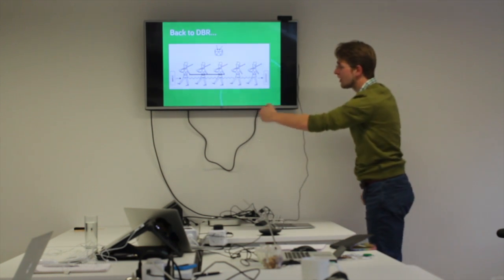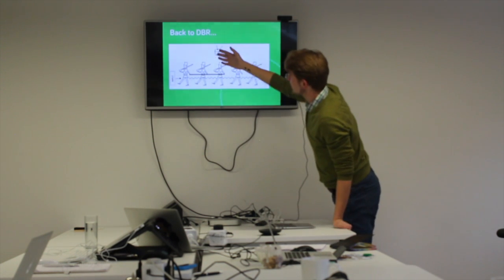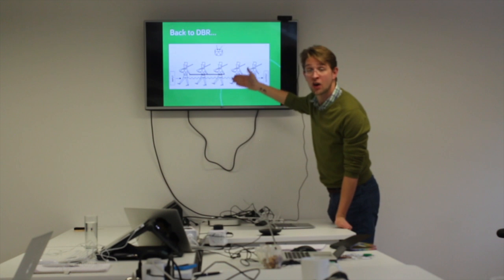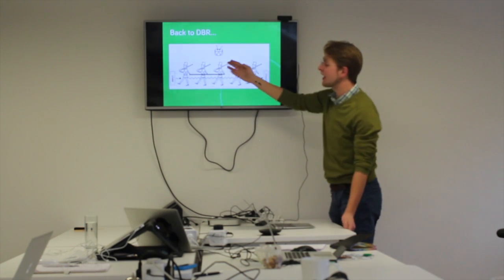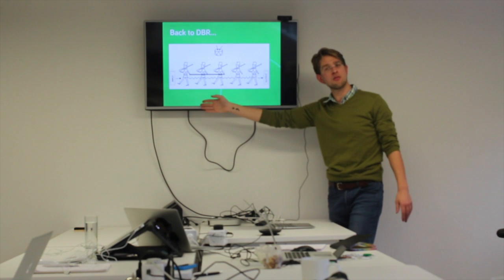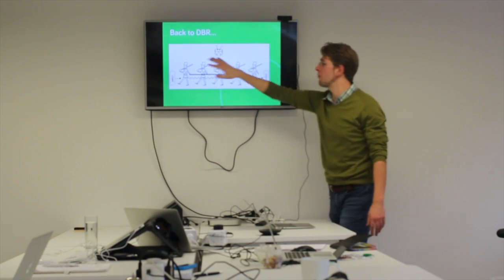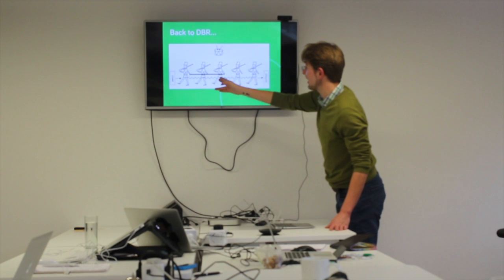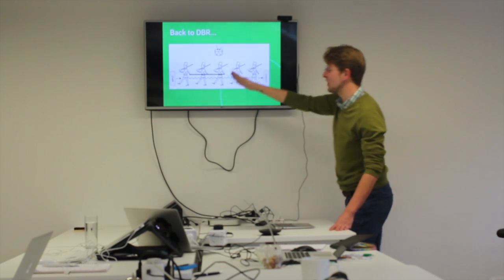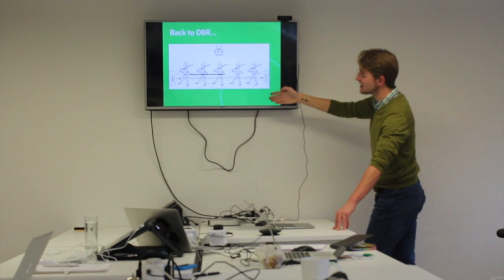upstream process. Then we're going to have the drum, which is a scheduling of the bottleneck process, right? So that the bottleneck is always in use, and we know that the work is being fed through into the system so that it meets the bottleneck at the point at which it needs to in order to be delivered at the time that it's needed.